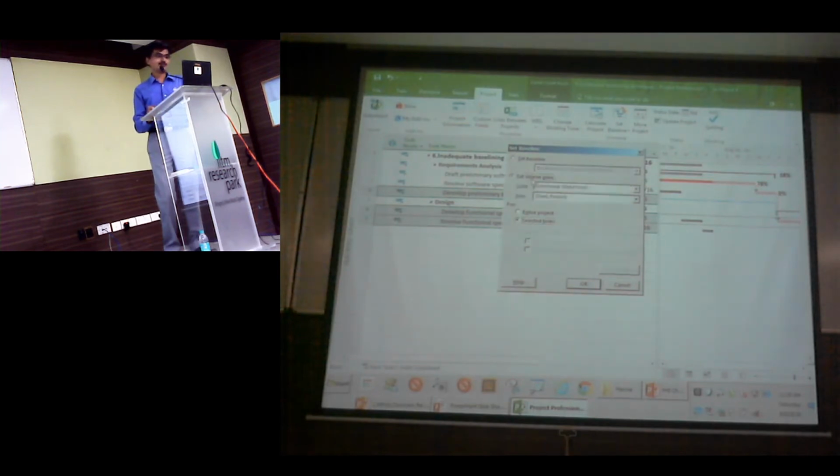Before you override, take a backup from baseline to baseline 1. Take a reference backup. But don't take backups for every small change, only when there's a major thing. You only need 10 baselines. Someone said unlimited or something. I don't know.